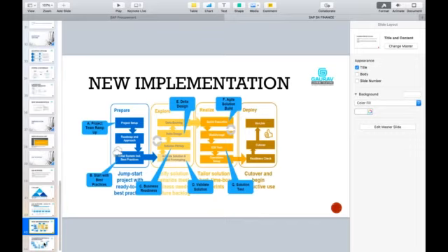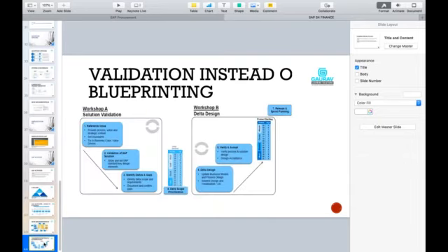So there are two kinds of workshops that will be happening with the customer. Workshop number one would be solution validation, which is part of your explore phase. What you will do is show the system to the client. Let me make it bigger. So you set up the scope in the reference value. Second is validation of the SAP solution, where you will be showing and telling the SAP standard key design elements to the customers. So you are actually showing the system and identifying fits and gaps. That is the whole purpose of the solution validation, to find out what is fit and what is gap.